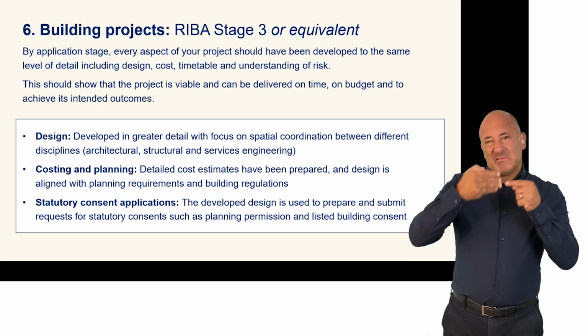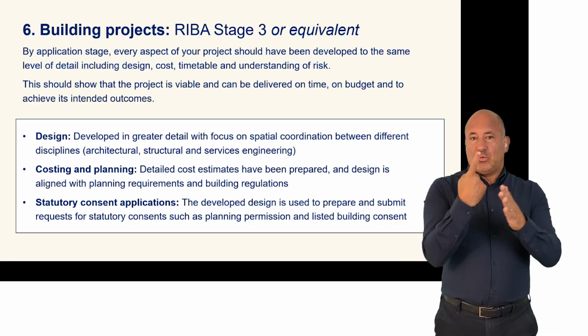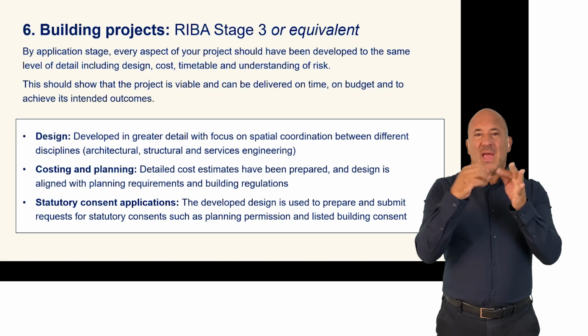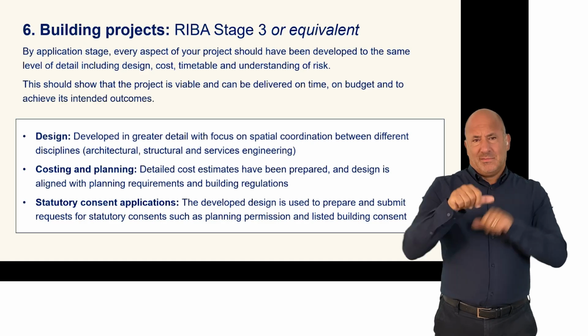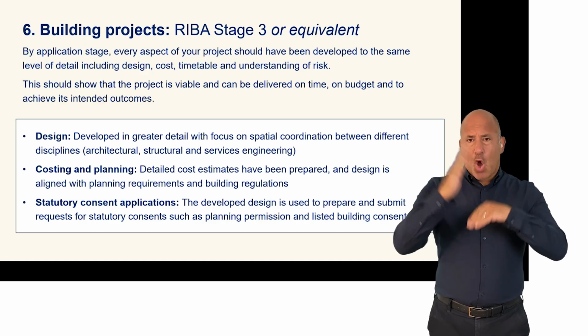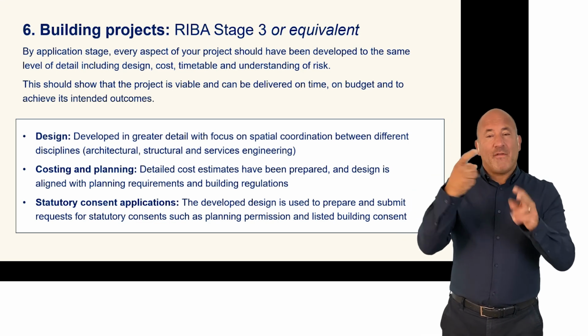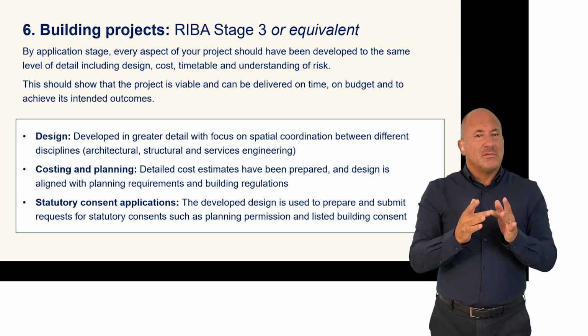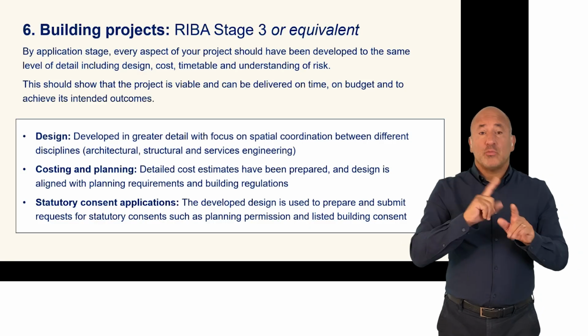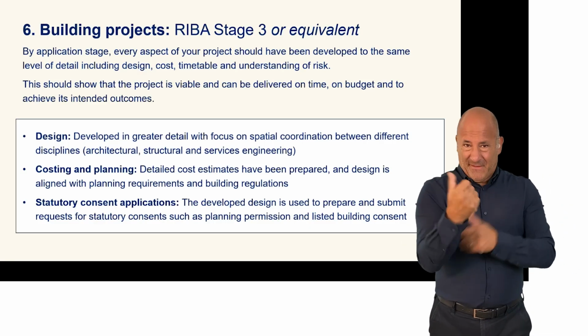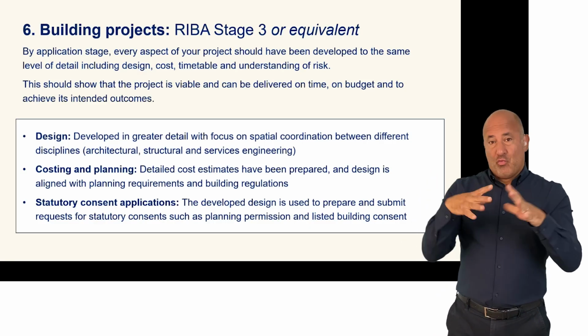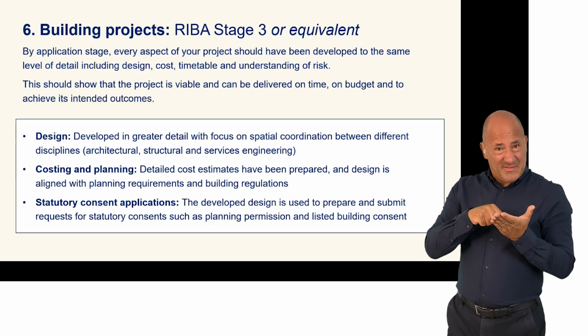These next few slides relate to buildings projects only. The REBA Plan of Work 2020 is a procedural guide for architects and construction professionals working on building projects. You can find a detailed breakdown on the REBA website. It is an eligibility requirement that building projects have completed REBA Work Stage 3, if you're following the REBA Work stages, by the full application submission.